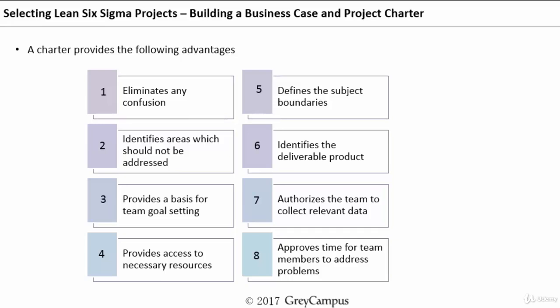The project charter also identifies all the deliverables. It authorizes the team to collect relevant data — since people in organizations are often reluctant to share data, and data is a critical requirement for any Six Sigma project, a formal project charter gives authority to the team to collect it. It also approves time for team members to address problems, ensuring that people engaged part-time in projects are released on time for project work.